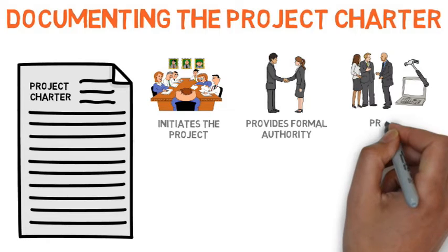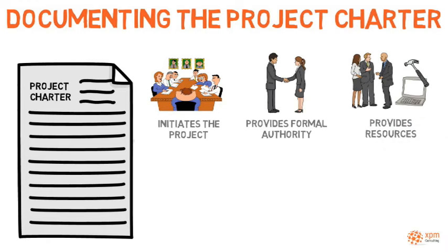Thirdly, the charter provides resources. Have you ever felt that team members did not have enough time to dedicate to your project? Did your projects get delayed due to lack of resource availability? The project charter helps reduce resource utilization conflicts between the project manager and functional managers, assigning the project manager the authority to use organizational resources.